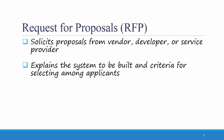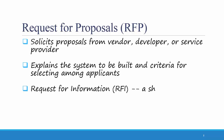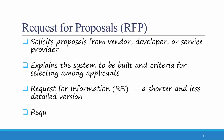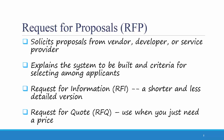The idea is that you write up a document similar to the system proposal from the analysis phase and send it out to one or more vendors, developers, or service providers, asking them to return a proposal of how they would complete the work and at what cost. A Request for Information, or RFI, is a shorter and less detailed version of an RFP. A Request for Quote, or RFQ, is what you use when you just need a price. RFQs are used more commonly when purchasing prepackaged software, while more detailed RFPs are used when outsourcing work to a service provider.